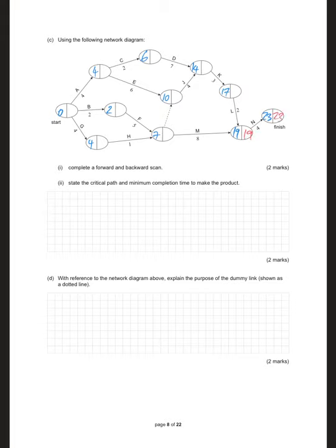23, 19, 19 take 2 is 17. I'll do the crit path first. 17 take 3 is 14. 14 take 4 is 10. 10 take nothing. We'll leave that until after. 14 takes 7. 7 only one way. 7 take 2 is 5. 10 take 6 is 4. 5 in a box. 4 take 4 is 0. That's the crit path done.